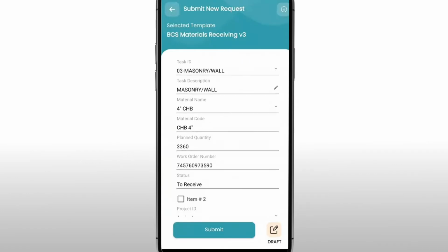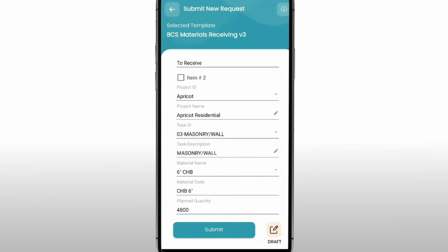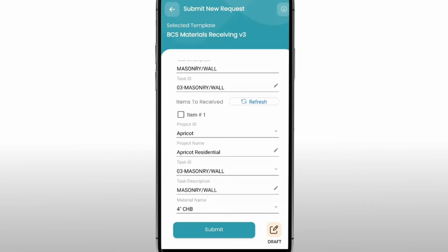materials delivered. Most of the time, or realistically, there are instances when the materials do not arrive together or will come from different suppliers. This gives you multiple purchase orders and can be hard to track. However, on Steer, we can consolidate multiple purchase orders and assign it to one project, allowing the receiver to accept materials partially, giving you greater visibility on materials received.